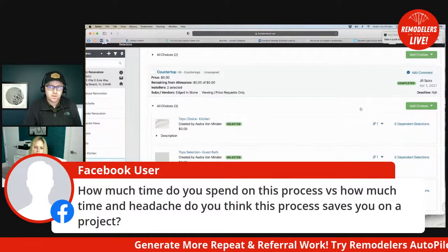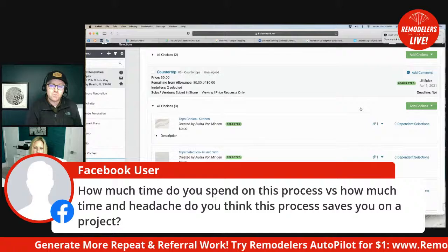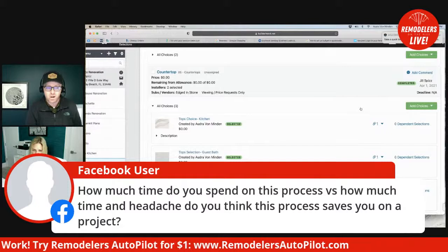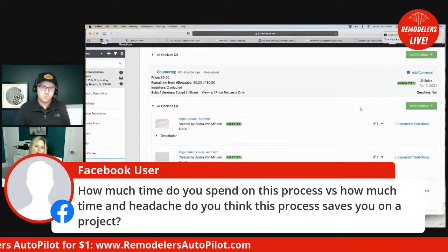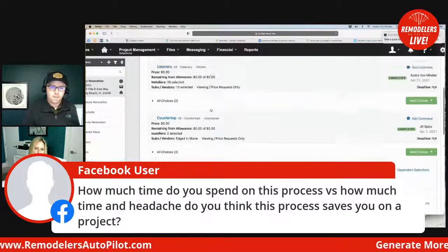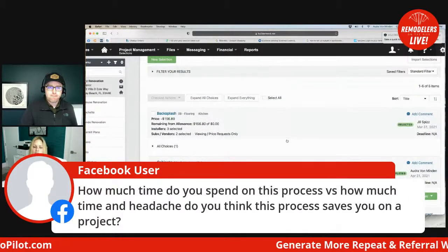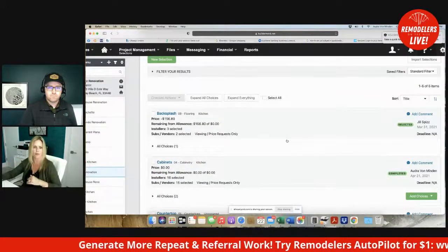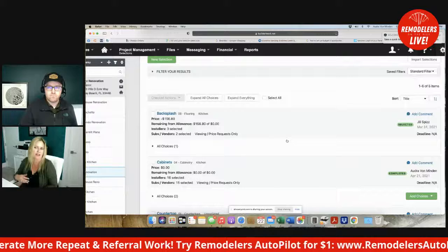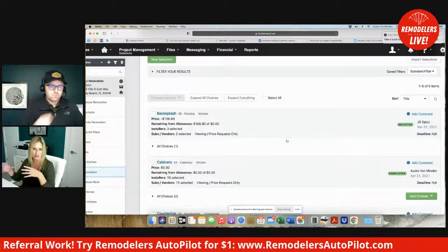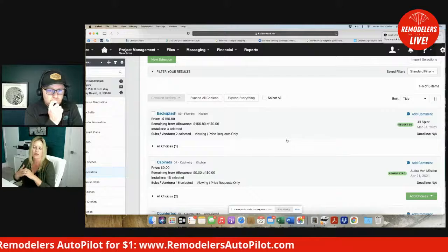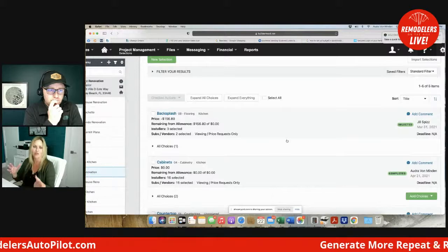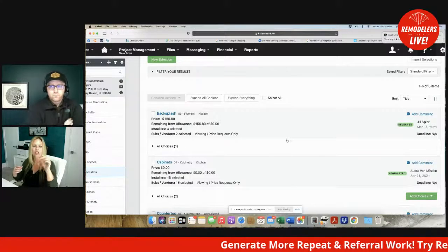Sean Billings was kind of sharing kind of what we were just saying. How much time do you spend on this process versus how much time and headache do you think this process saves you on a project? That's a great question. And to be honest, I just did this job, Spiz and Cohen. I just set up recently. I would say I spent about 1 hour doing all of this setup for their selections and stuff. Now that's after, of course, I've sent them to make the choices and gotten the information and feedback back from my suppliers. But I would say an hour is really all it takes once you have all the information to go in and set this up.